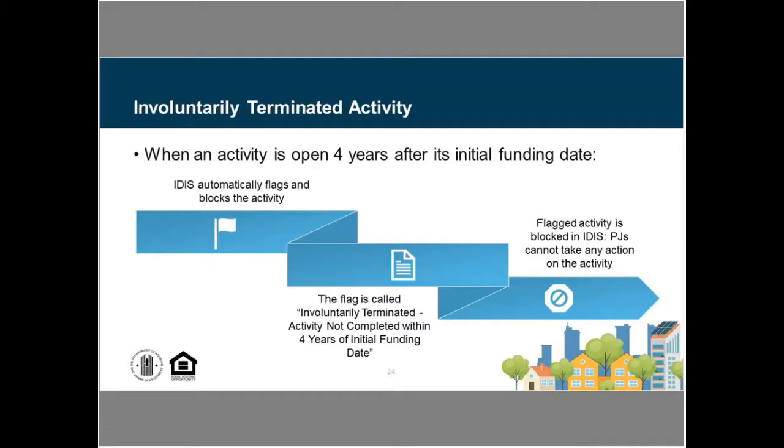So we've talked about the IDIS report as being a tool, but I would think that most PJs will have some kind of ongoing reporting that's happening for their funded projects. So maybe you have quarterly or semi-annual reporting that's coming from those funded projects. You could ask them or require them to report in a narrative format based on that project timeline with each of their semi-annual or quarterly reports. So you could have pretty good information coming to you on a regular basis about how that project is moving forward.